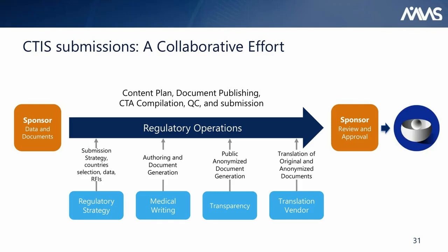We can keep data ready on the electronic database as soon as it is ready for submission. We suggest starting the submission activities 3 months in advance, considering planning, scoping, authoring, redaction, and translation of the documents for CTIS submission. We can prioritize the documents based on page count and data complexity. A higher number of pages and complex documents call for an early start.